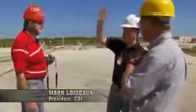When we walk around the structure, you'll see that we have a lot more structural weight and a lot more structural capability on the north side than we do the south. Mark's demolition strategy looks something like this. From a single trigger point, he'll ignite a charge that travels through two lines at over 15,000 miles per hour. The charge will ignite explosives loaded into the front of the first five levels. The tower should begin to fall.